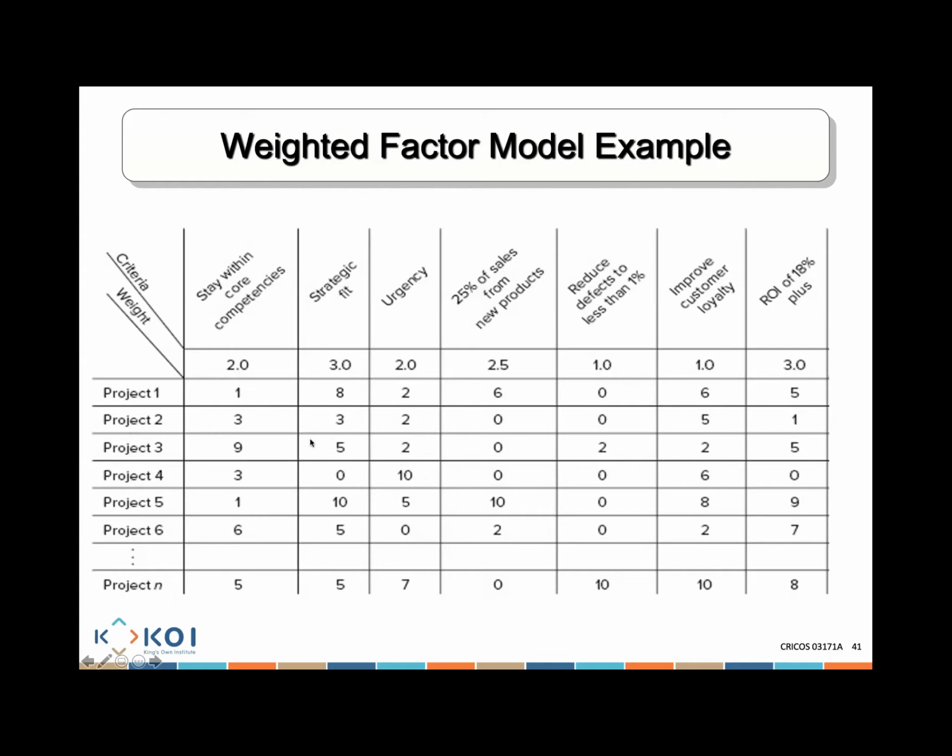The way you use them is you need to calculate the totals. 2 multiply 1 equals how much? 2. 2 plus 3 multiply 8 plus 24, plus 2 multiply 2, plus 2.5 multiply 6, plus 1 multiply 0, plus 10 multiply 6, sorry, 1 multiply 6, plus 3 multiply 5 will give me the total for that project.